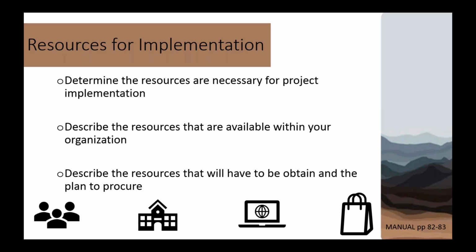Perhaps you're having somebody come in and do some training for you, any licenses or permits that you're going to need, and any other types of services or resources that you're going to need from within your organization and from the outside that will come in and help you with the implementation and provide resources. Again, you're going to determine what resources are needed, describe what you have available within your organization, and then describe the resource that you need to obtain and the plan to procure them.